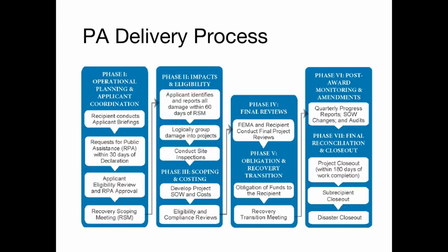Damage information is the foundation of the overall project award. The scope of work and cost eligibility is tied to the eligibility of damage. Once FEMA, HSEMD, and you, the applicant, agree on the damages, descriptions, and dimensions, projects are then scoped and costed. Documentation is reviewed, and once the final reviews are completed, projects are obligated. All the project formulation occurs in FEMA's grants portal system.